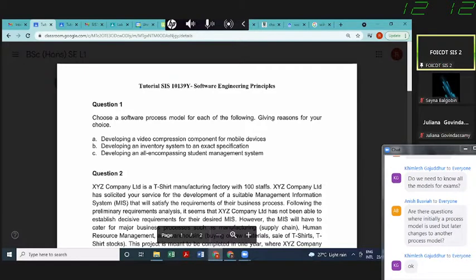For example, let's say you're working on a project, but you find that your team leader has a high probability of leaving the project. So there's a high element of risk. You're working on a project where you have a compressed schedule and there is a high probability that we'll not finish within the deadline. Okay, so element of risk. You're working on a project with a tight budget, and we might exceed the budget. Okay, so element of risk.